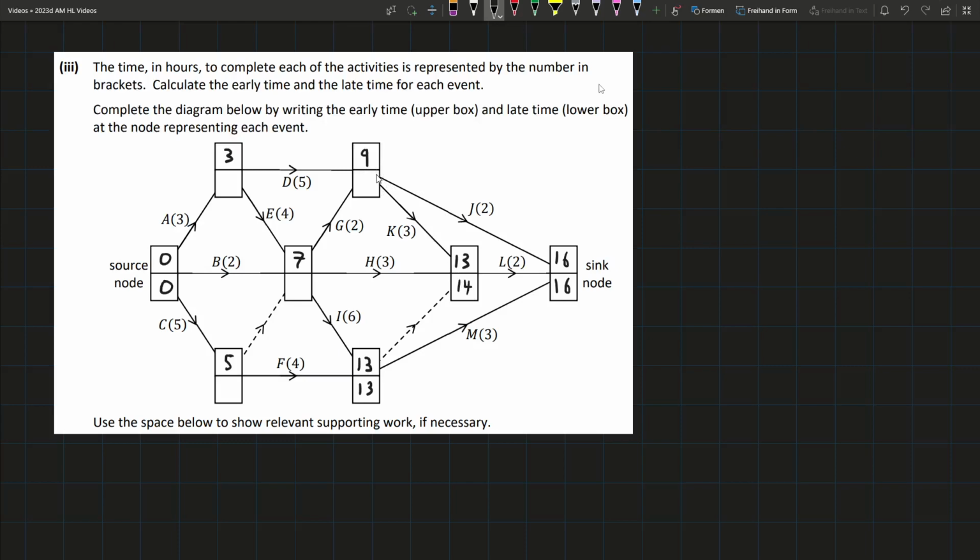Now we can look at this one, since we have the 2 hours going into it. So here we have, if we were to look at just J, if we started J on day 14, then we could have the 2 and we get here on time, all good, all dandy.